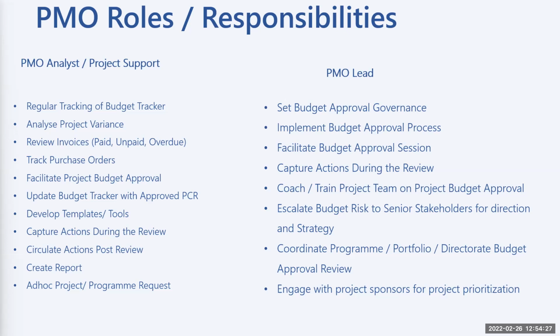You might not necessarily create the project budget request. The PM will create it, the subject matter expert will create it, but you support them to make sure that is going well and the approval is sought and received. Then you update your budget tracker with the approved PCR. Once you update it with the approved PCR, that will increase your original budget.